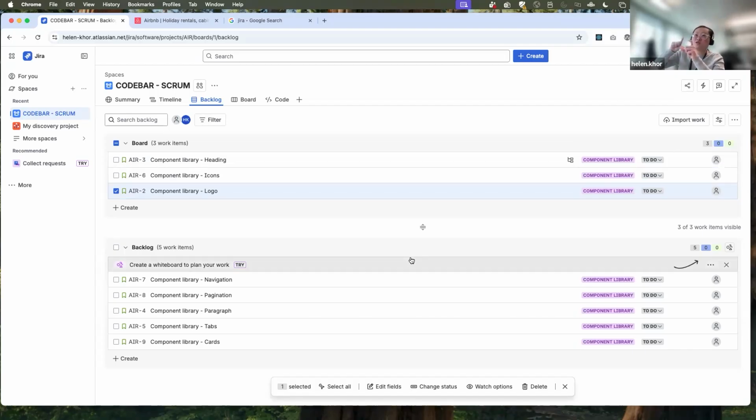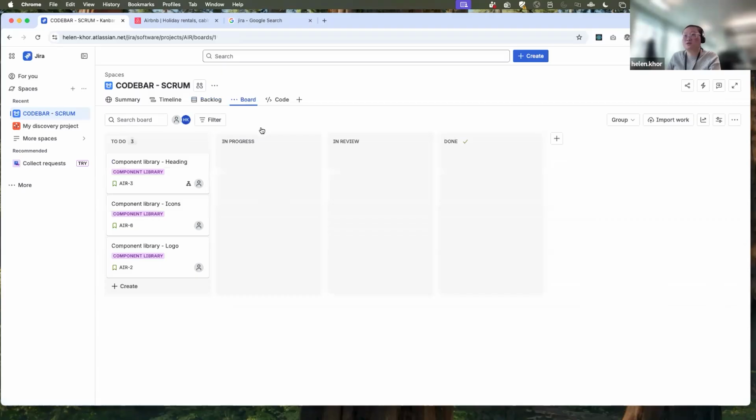And you can actually start to slot out. You can manage your sprints 2, 3 sprints ahead, so that you know what's coming up. And if someone is quicker, you can bring something from sprint 2 into sprint 1, for example. So that happens sometimes. And then once you have that in your board, you can see now we're actually starting.